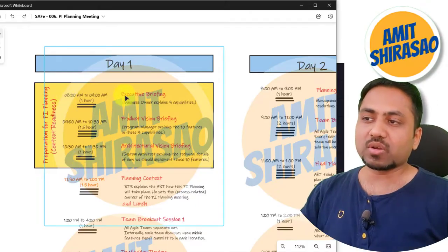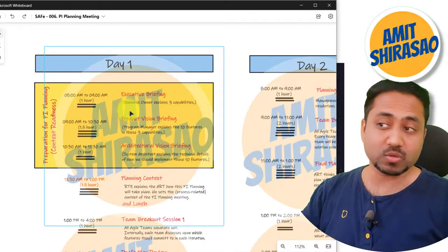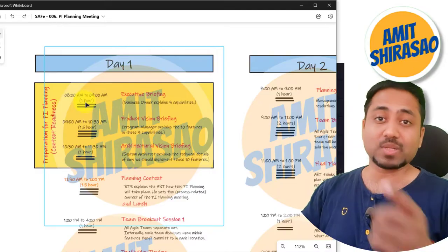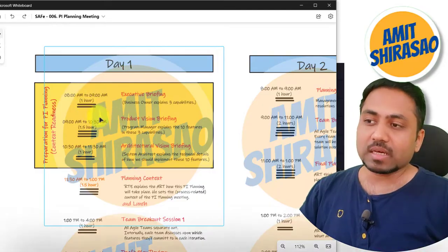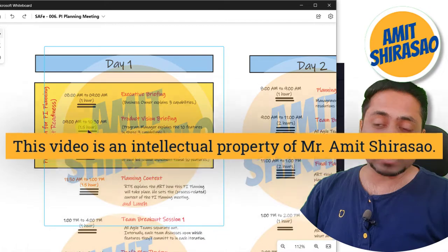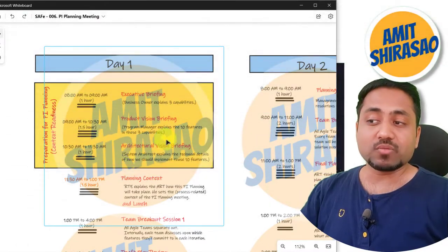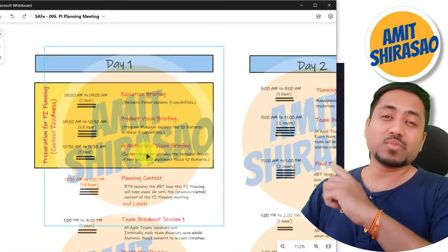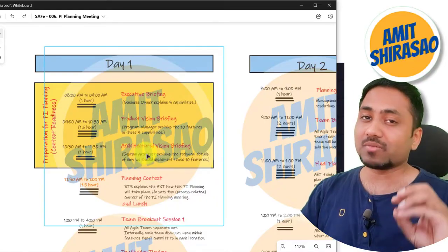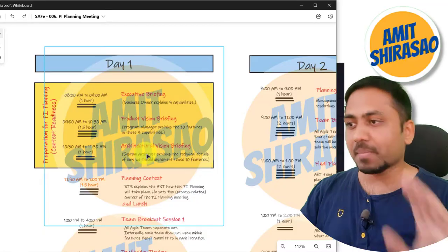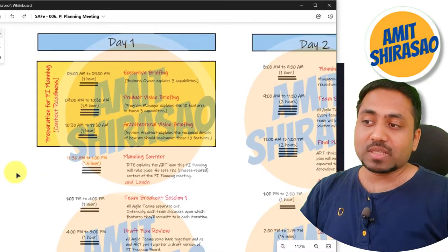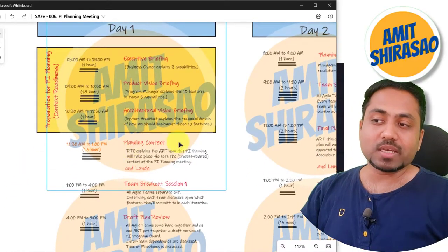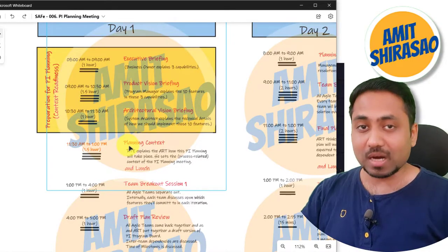Your executive briefing given by your business owner happens for 1 hour, as I explained in my previous video. Then the product vision briefing happens for 1.5 hours, and then the architectural vision briefing happens for 1 hour. For all these 3 briefings, please refer to my previous video. I've given examples also, and I've explained it in great detail over there. Now going ahead, after that, your RTE basically explains the planning context to the ART.